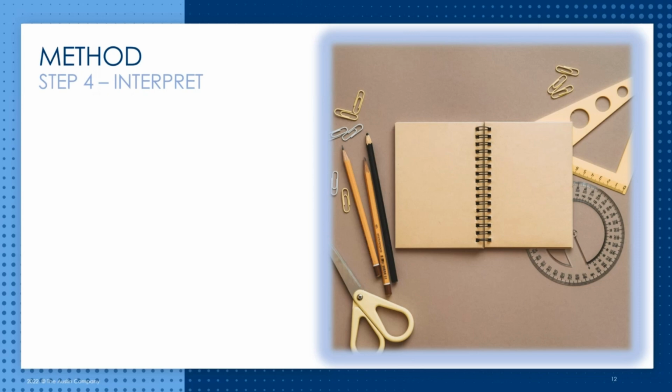In building a robust estimate, we need to be cognizant of the fact that not everything is included in the virtual model. What are the gaps of scope in this data, such as connection plates, rebar, and other items that are not typically modeled? Our custom script assigns allotments for such gaps so that predictions are comprehensive.